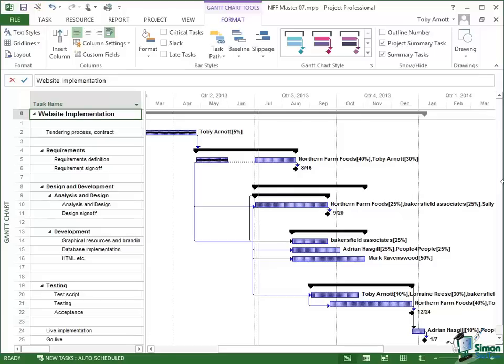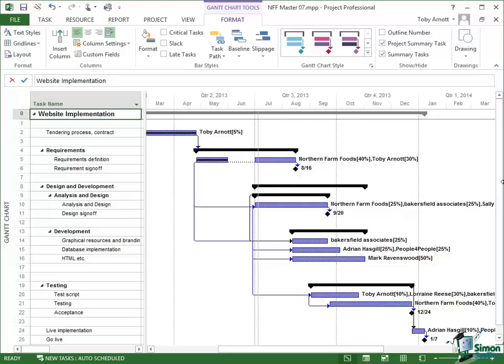When we looked at the cost reports as a consequence of these changes we could see some increases in cost. But in general terms, particularly when you're dealing with much larger and more complex projects, as the project progresses it's sometimes very difficult to work out how significant cost increases are, whether they're associated with costs that are running away or whether they're associated with making better progress than you planned.